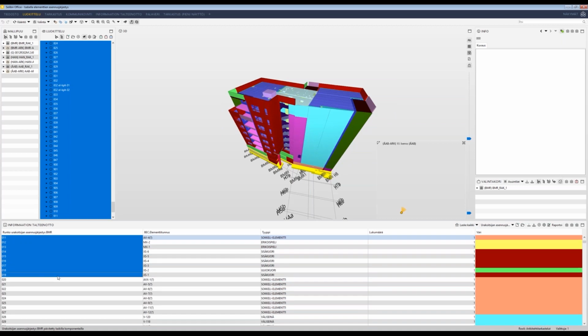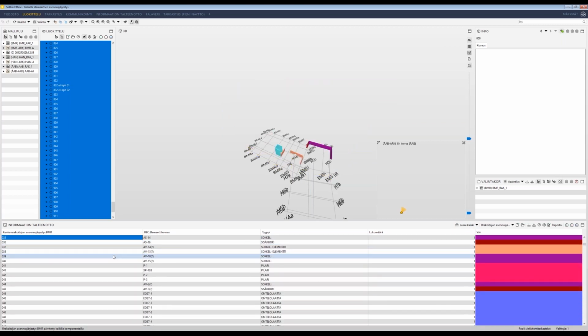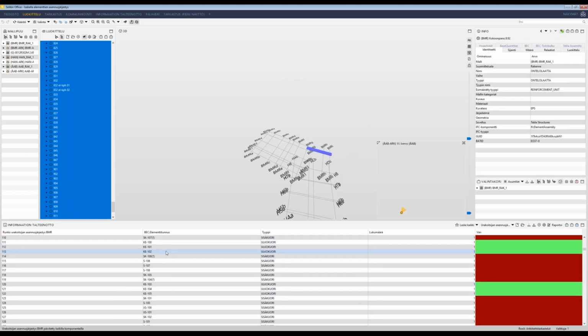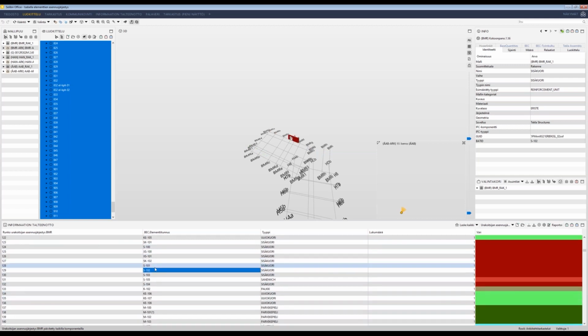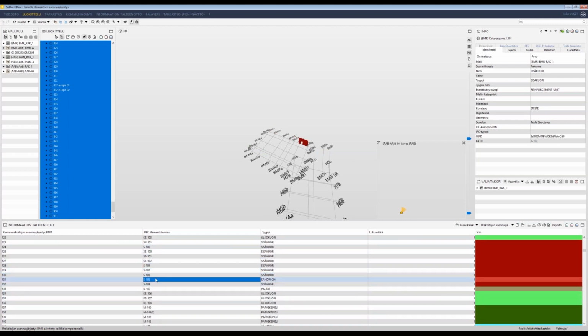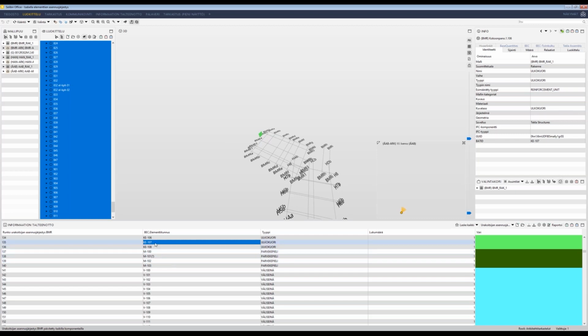So in here we have the same numbered order of the elements, and each of the elements has its own name that we can use to identify each and every one of them individually. In this way, we can list them out in the same order that they are supposed to be installed, and use that list for all of those coordination purposes.